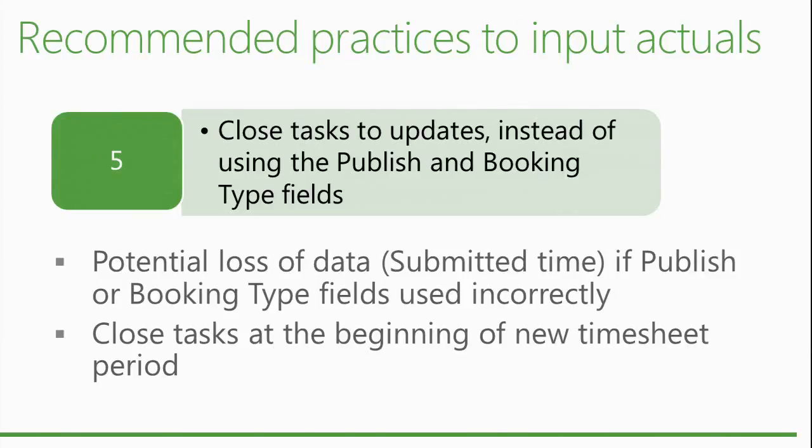Have there been any reports of performance issues in the time entry piece of SharePoint? The time entry, no, because it's just a regular project. If you use timesheet, there is no issue. But these rules also apply, by the way, to regular projects, where we recommend not to have very long duration for a single task and a lot of resources on each task. Because otherwise, yeah, it's going to generate a lot of rows, and it's going to impact the performance.